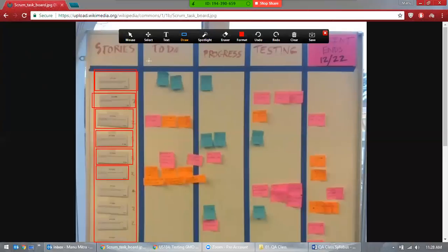And then you have this To Do column. See this To Do column. And if you see this, these are sticky notes. That means whenever new work gets started, the first person to pick up the user story is actually the developer, right? Because you cannot start testing unless development is completed. Does it make sense? You are allocated as a tester, that's fine, and you can test once development is completed, but you are not the one to start first. First, the person who starts is the developer.